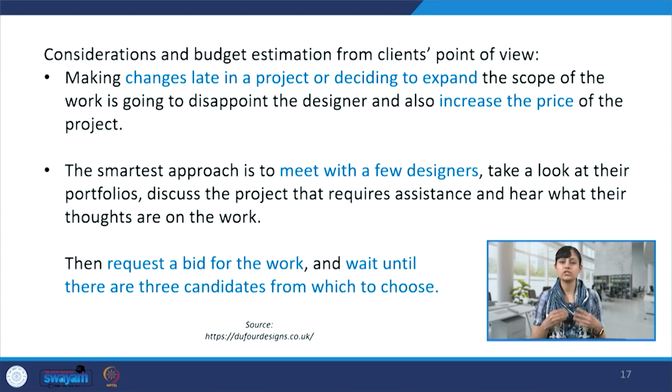And there are some considerations from the point of view of clientele. Making changes, delaying the project, or abruptly expanding the scope without involving the client. So the designer has to be very, very sensitive and do things responsibly, because delays and expansion of scope could increase the price of the project. So one has to be very careful about it.